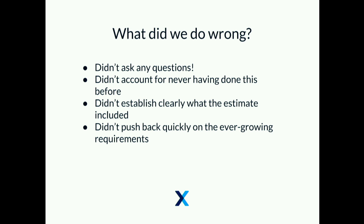We probably should have downloaded the module, installed it, tested it out, saw what it did, and then gone back to them and said, 'Hey, where do you want it? What other customizations might we need?' We didn't tell them honestly what we were doing — we were estimating installing a module, and that was nowhere near what they expected. And finally, we didn't push back on the requirements as they kept coming at us. We didn't stop and say, 'We've met the initial implementation; let's step back, see what else you want, and re-estimate.' It took eight months to finally get to that point.